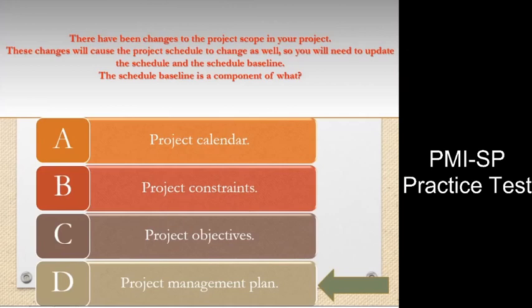The objective of a project management plan is to define the approach to be used by the project team to deliver the intended project management scope of the project. The project manager creates the project management plan with the inputs from the project team and key stakeholders. The plan should be agreed and approved by at least the project team and its key stakeholders.